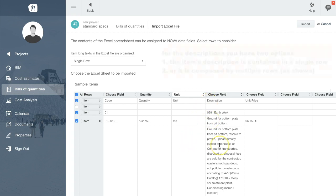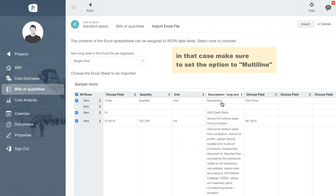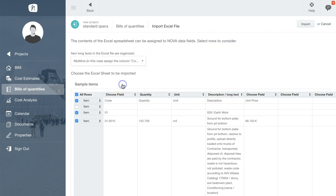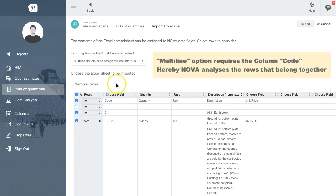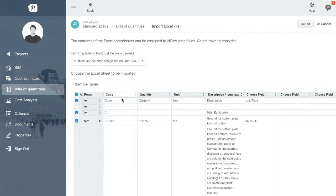After mapping the column, make sure to set the option above to Multiline. And if you use this option you must also map the column code. This allows Nova to analyze rows that belong together.